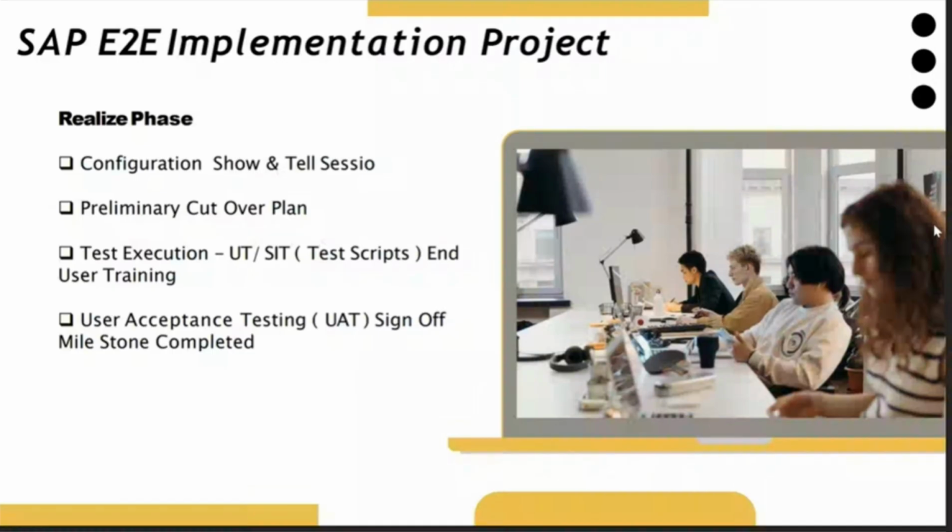Okay, change this, change that. I need some enhancement. Have you done this? Oh, okay, we did not discuss this in Fit to Standard. Yes, I need it. So you note it down, then you have to talk to your project manager. They are telling these new requirements. Okay, accept or reject. So at the end of the day, you have to take care of everything, correct?